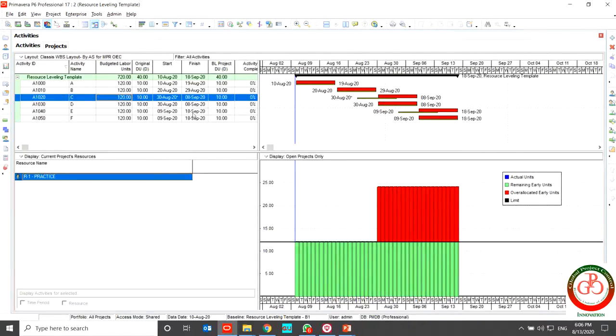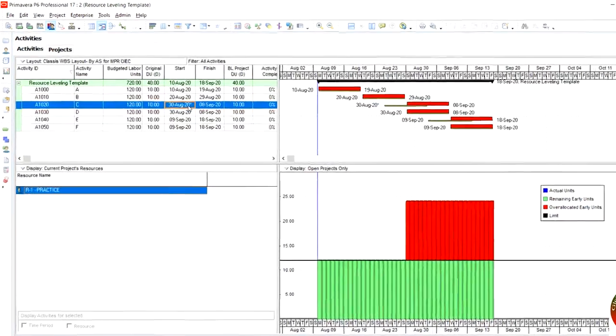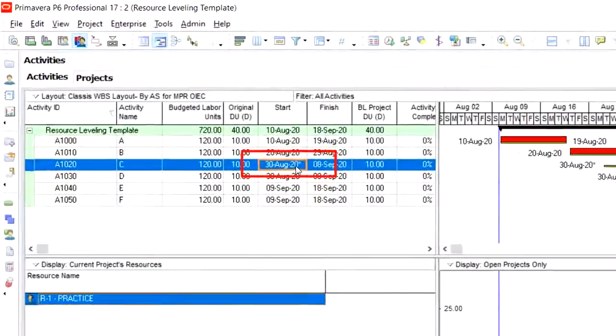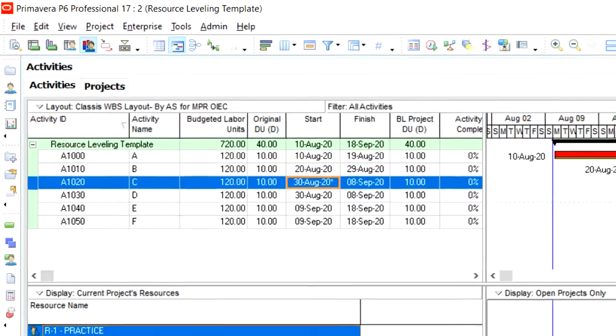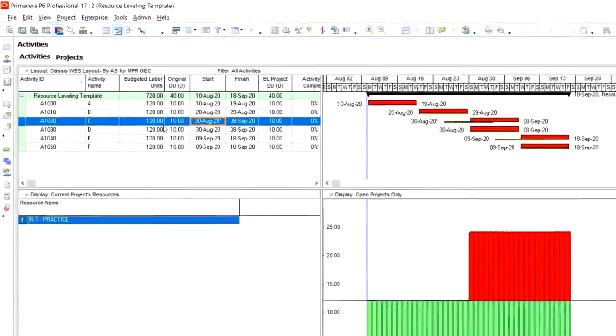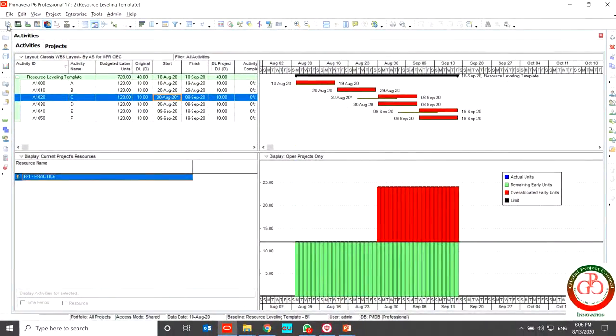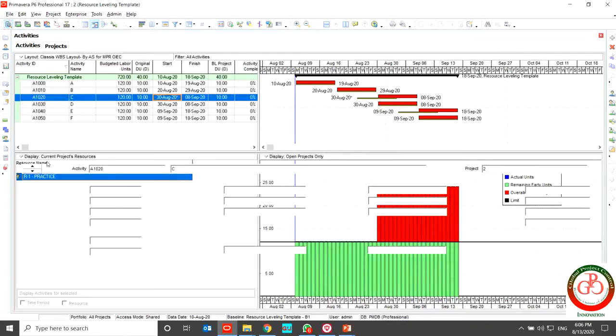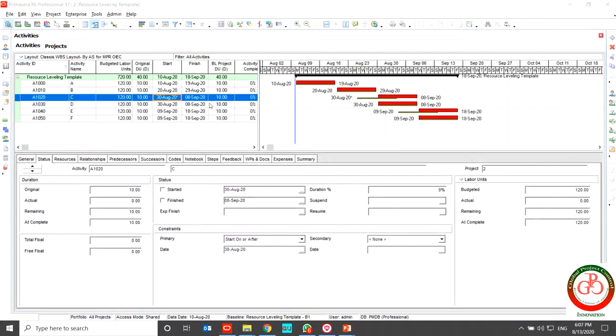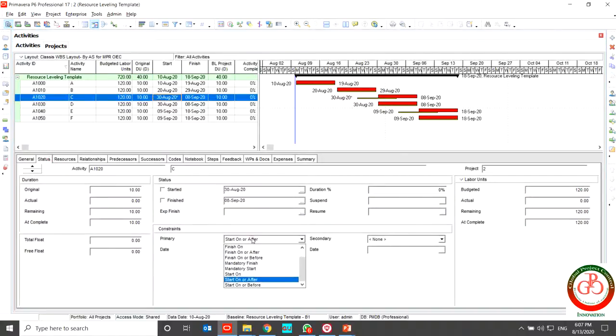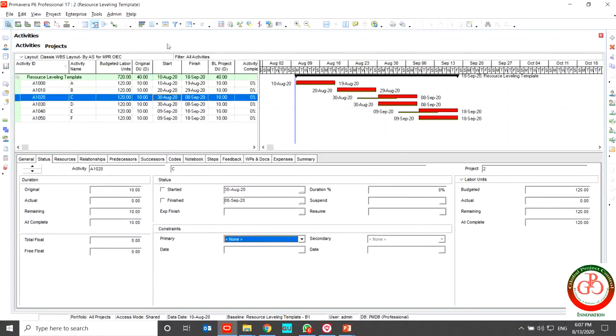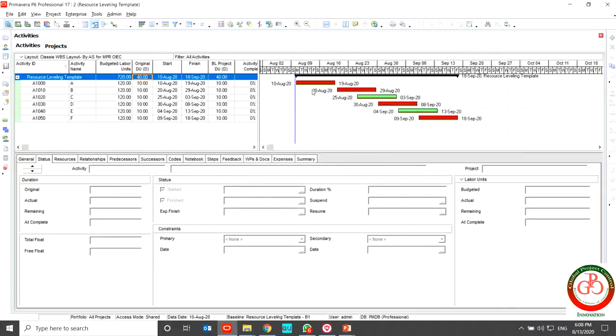This is my project. I have a wall constraint in my project. Because it's not related to baseline I'm going to remove it from my project. I select the activity first. I'm going to relationship status: none. And my project come back to 14 days.